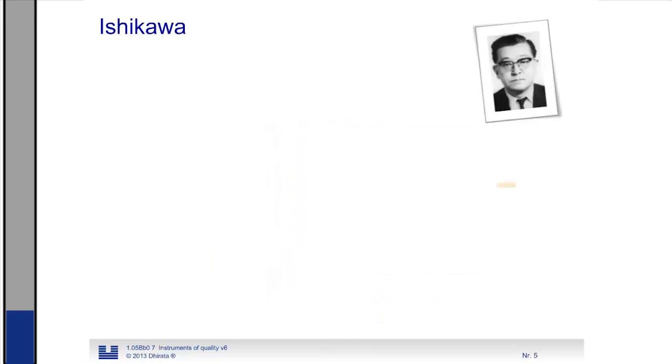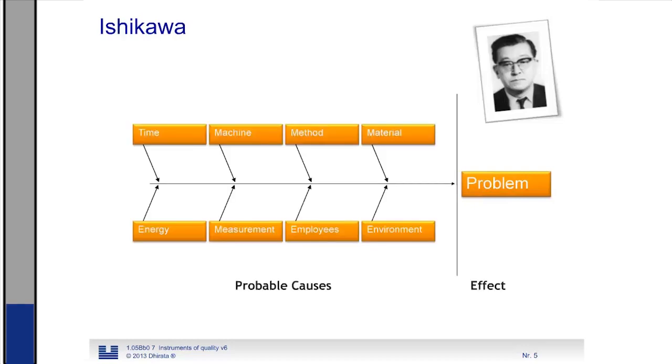Now suppose that you have come with the previous techniques to the conclusion that at some part of your project too many mistakes are made. The Ishikawa diagram, also known as the Fishbone Diagram, gives you a handy tool to check for the possible causes. The Fishbone Diagram is actually a cause breakdown structure. In this example, there are 8 categories where you can find a possible cause.